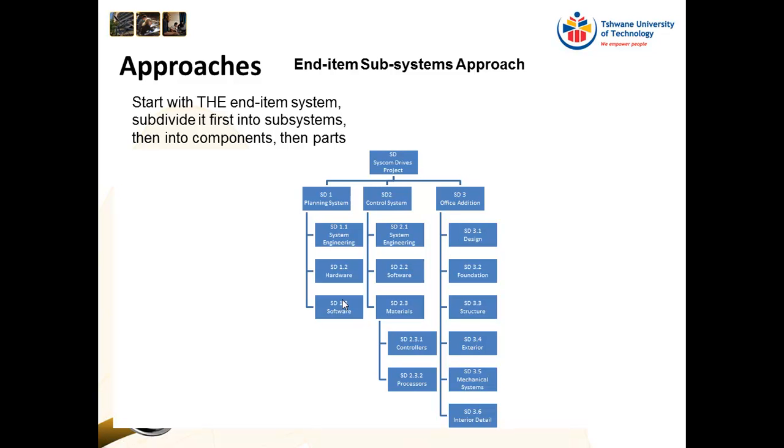How do we know it's a high level work breakdown structure? Because it does not have work packages yet. Because when we have a work package, we have a verb and an object, because we have to do something. Okay, so do something. Build the wall, kick the dog. Sorry, that's a bad example. But design the stall, select the tablecloth, you know. So at the lowest level of the work packages, we will have a verb and an object.